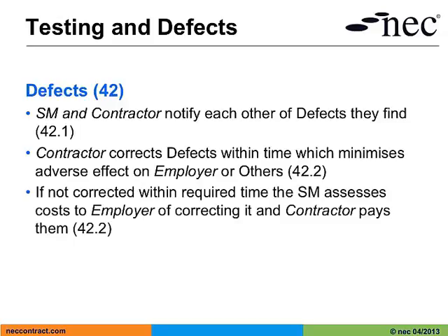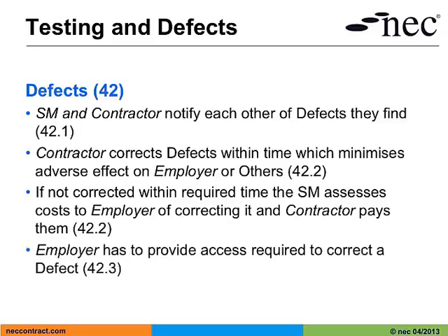If a defect is not corrected within the required time, the service manager has a responsibility to assess the cost to the employer of correcting it, and the contractor pays them. It is also important that the employer provides access to correct a defect.